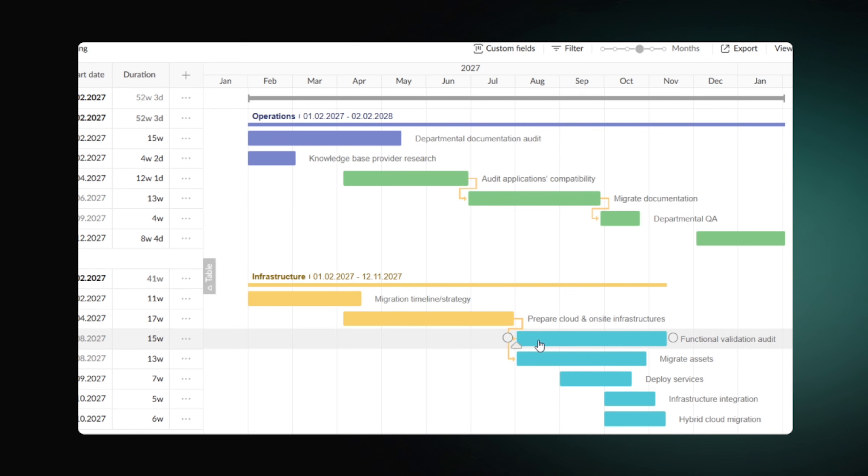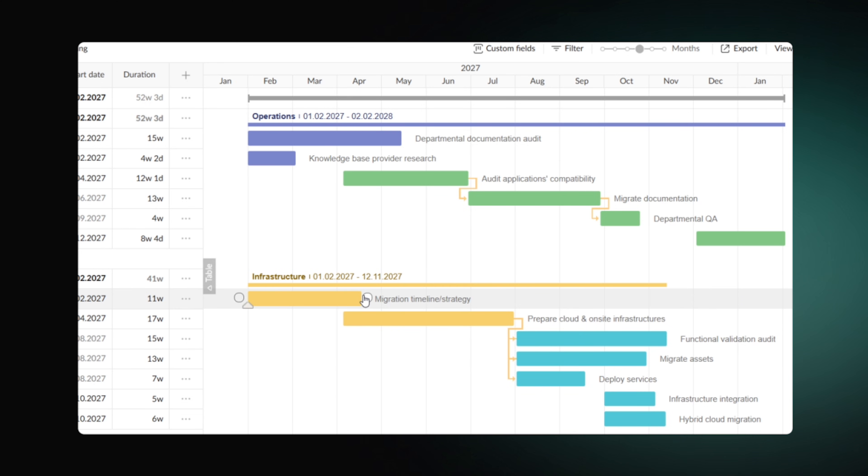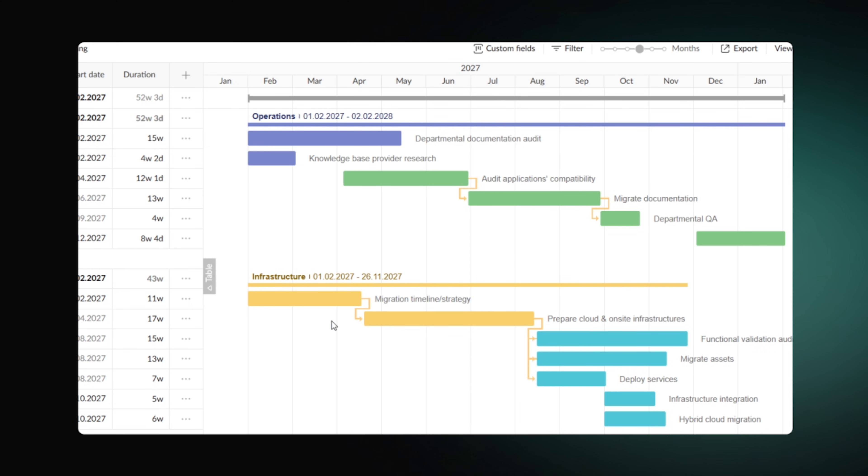If you find out that the time plan for the step isn't enough, you can easily change its end date, while GanttPro will automatically reschedule the dependent ones. Nevertheless, we strongly recommend leaving space for unpredicted work from the beginning.